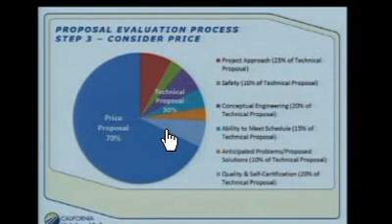By creating a competition for the technical piece, we think we're going to get strong technical proposals and some very well thought out plans from these proposal teams. And we're making it very competitive because if you're not in the top 3, you'll be dropped off. Then we move to the price, and because it's more heavily weighted in price in this second phase, we think we'll get some very good competition and a very fair and reasonable price.